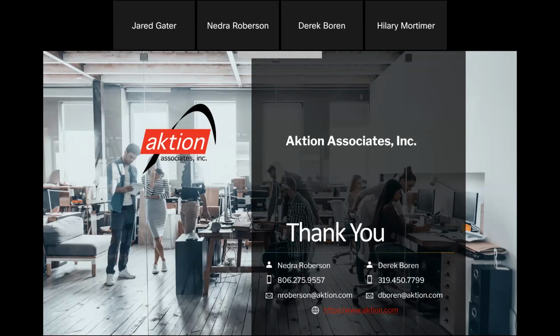So we're working through that in a couple different places. Nidra and I were playing with it a little bit, even with an amendment or an adjustment to the contract that goes inside of there and pushes that over. We're playing with an idea to use a trigger, basically. So when your contract management gets adjusted, it's going to push that value all the way down to the billing terms. Right now, you have to hit save on it again so it fires and pulls those values back over there.